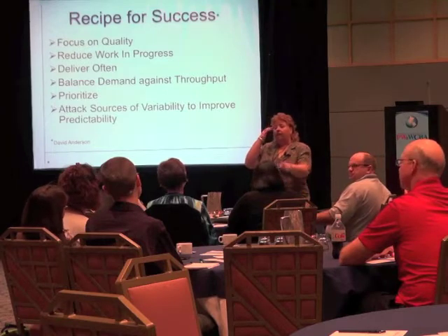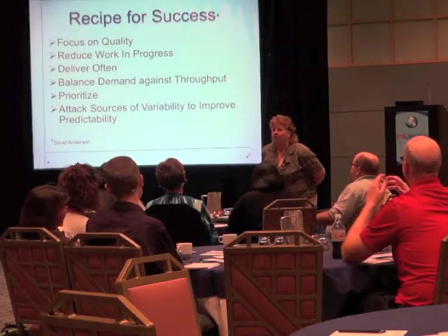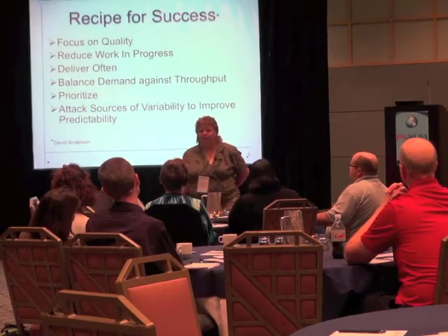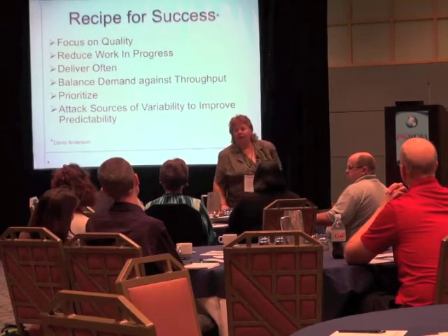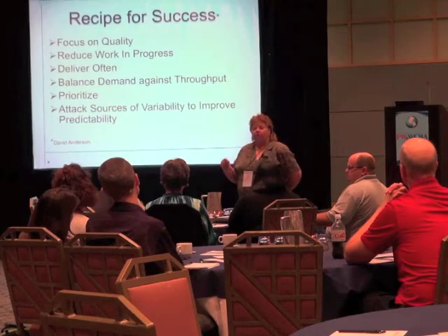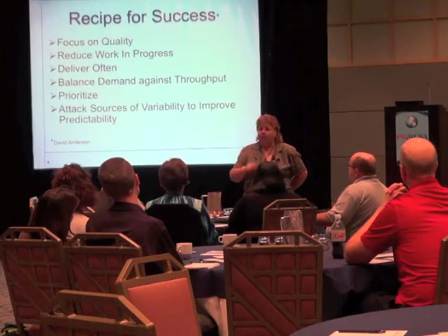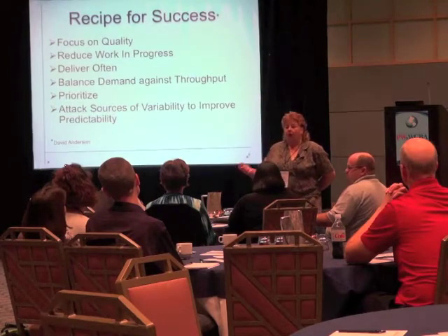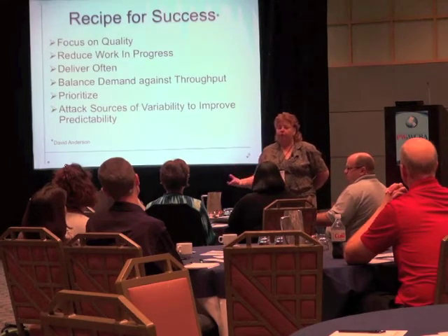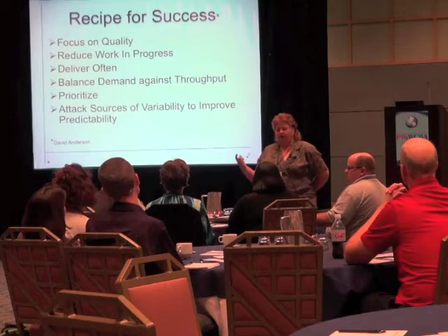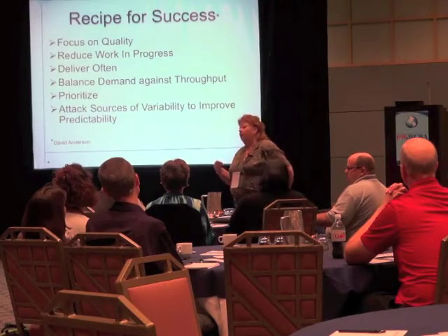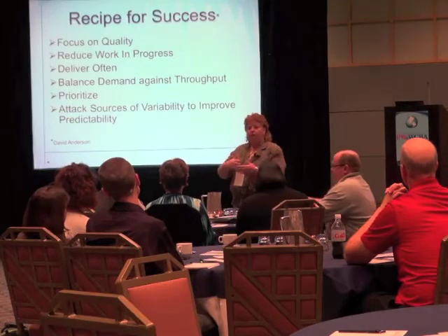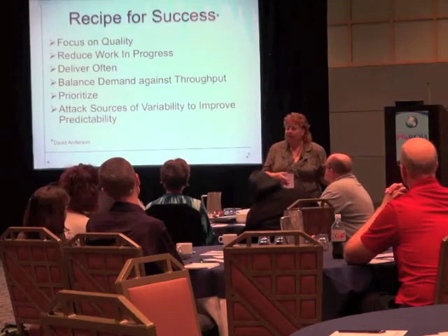Aha, that actually comes into a different lean principle, which is you don't tell the worker how long it takes, you ask the worker how long is this going to take you to do it, and if they come back with a number that's too high, the conversation then shifts to help me understand why. What all are you going to do in that time? They come back and say it's going to take me a week. Gosh, a week seems long to me. I was expecting something more like a day, maybe a day and a half. Could you explain to me, what are you going to do in the week? And have them break down the tasks.